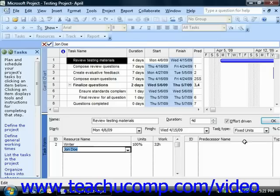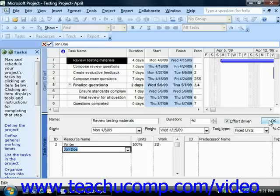Note that the Effort Driven checkbox in this pane is checked, and that Fixed Units is selected under the Task Type drop-down in this pane. That means that when you click the OK button in the task form to save your changes, Microsoft Project will use effort-driven scheduling on this task and recalculate the duration of the task while holding the actual units of work performed as a fixed value. This will then cause Microsoft Project to decrease the duration of the task based on the extra work that the second resource can perform.